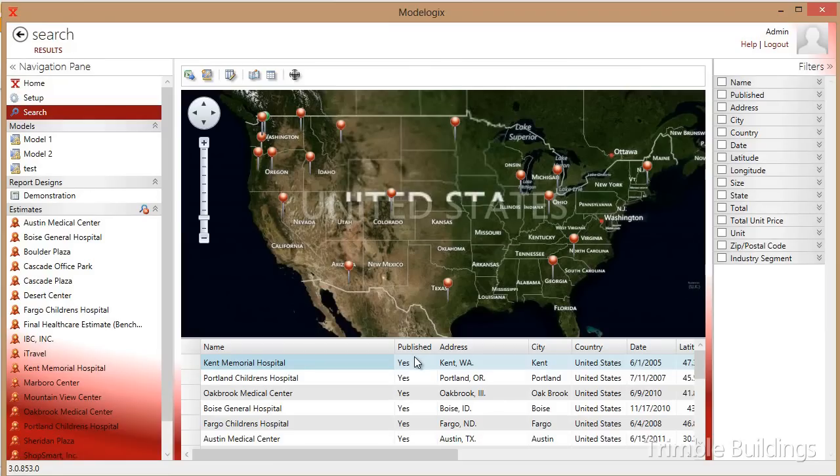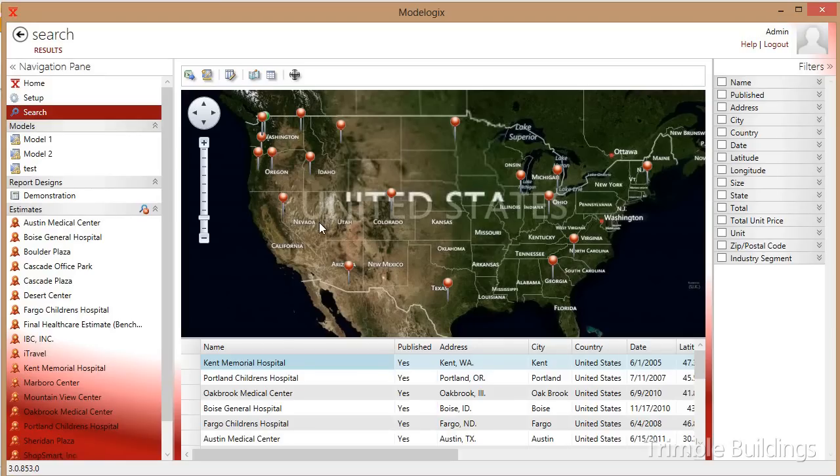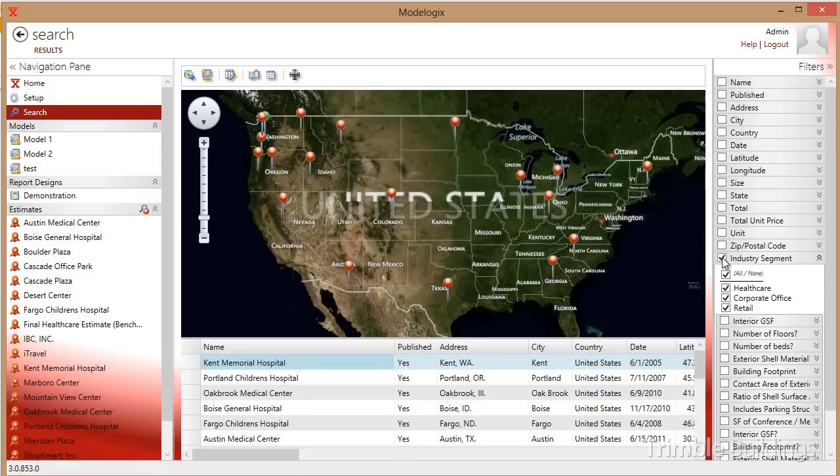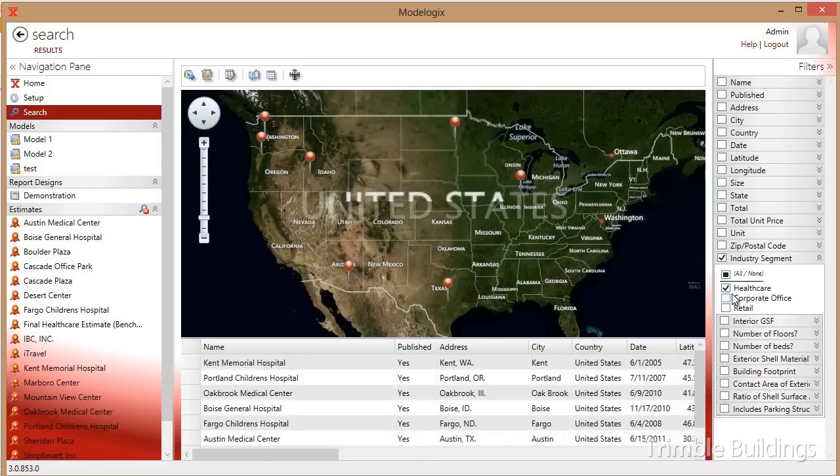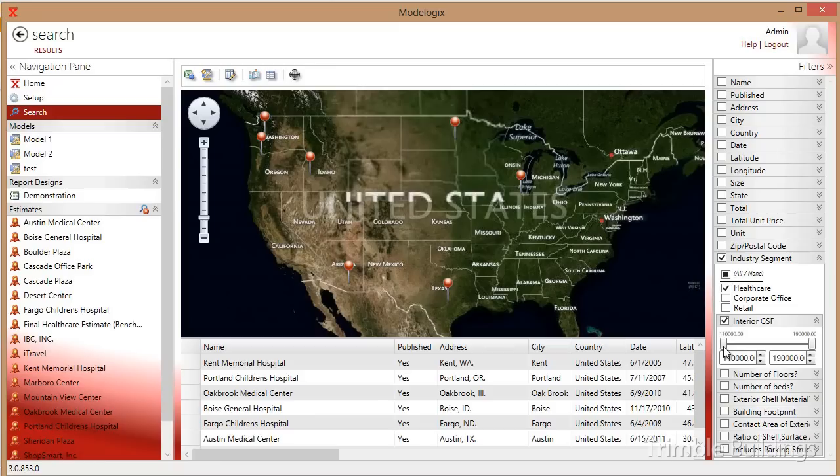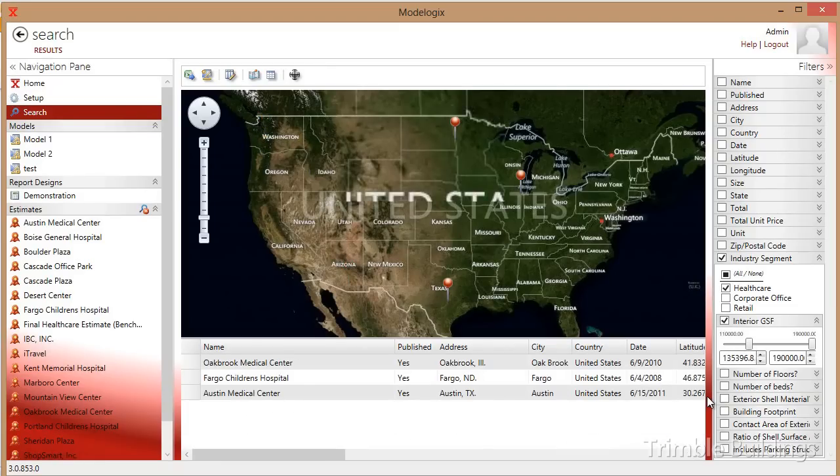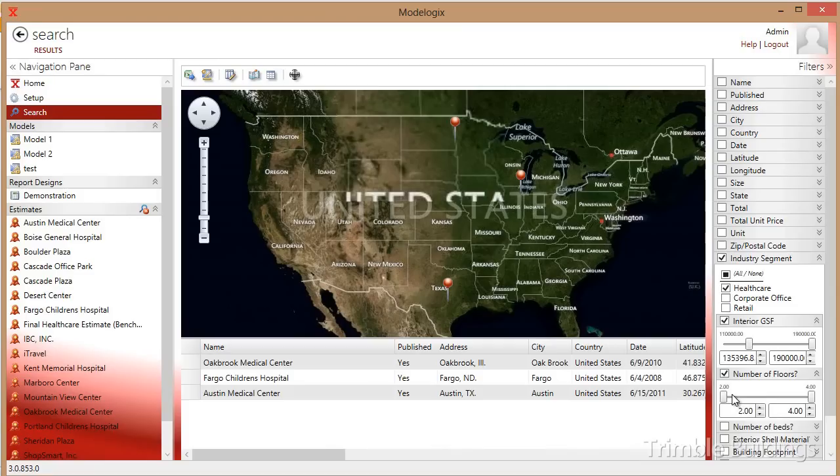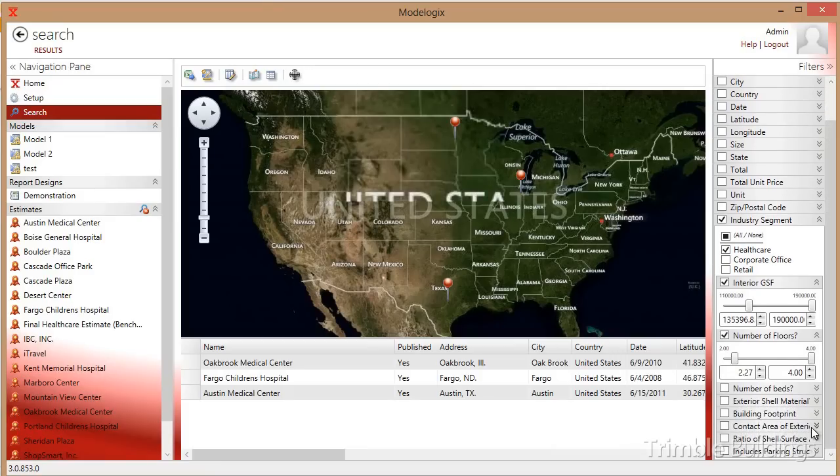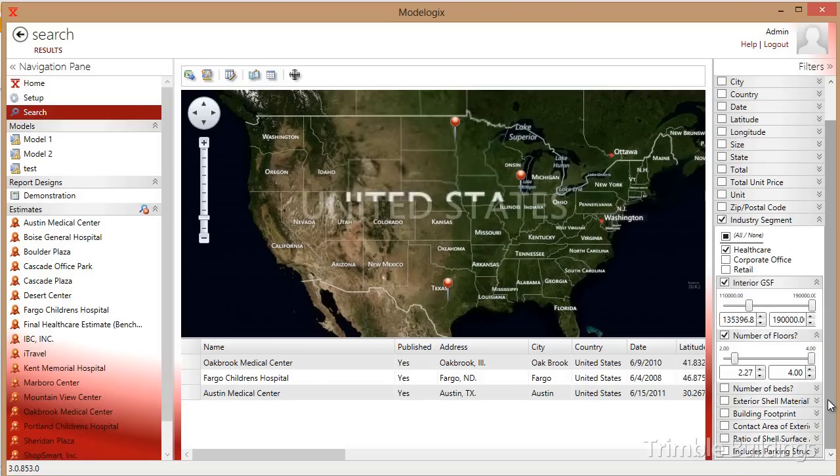Now, this map and the list of projects below is the unfiltered list of projects. But remember, I'm trying to eliminate those projects that are not like the project that I currently need to create a budget for. If I needed to look for just healthcare projects of a certain type, I can put those project attributes to use by clicking over here on the right-hand side, maybe tell the system I'm only looking for healthcare projects, I'm only looking for healthcare projects that are greater than 130,000 square feet, I'm only looking for healthcare projects that have more than two floors, so on and so forth. You see additional project attributes here. These are all customizable by the user. Each individual customer of Modelogix creates their own project attributes that allows them to quickly search the entire database and look for just the projects they're interested in.